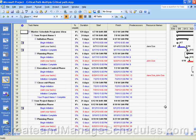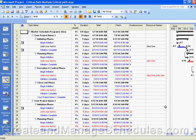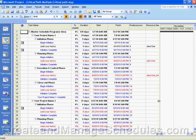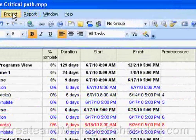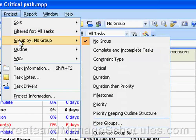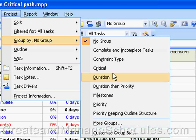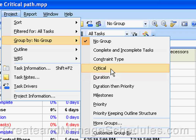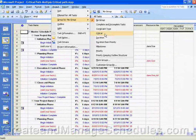To group tasks based on whether they are on the critical path, you would do the following. First, select the task view that you want to work in. Right now we're in the Tracking Gantt view, but there are different views you can select. Then go to the menu option Project and select Group By. It says Group By here — right now it says 'no group' because I don't have a group selected. You can see in the cascading menu the default group by options, which are basically a list of predefined groups.